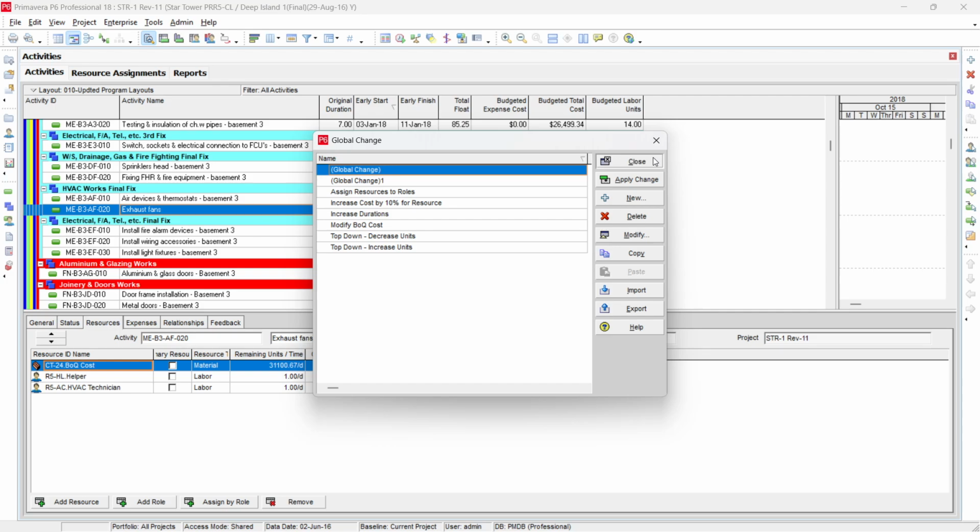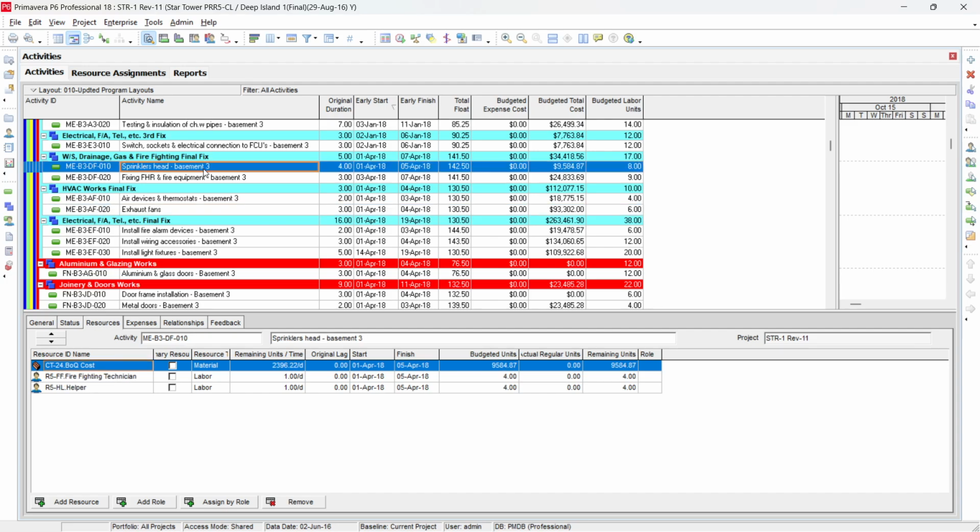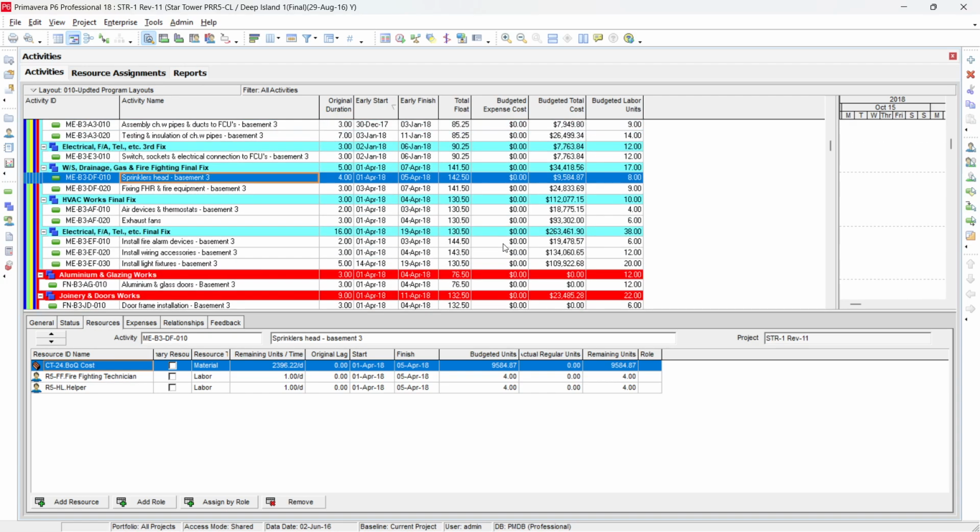My program's budgeted units and budgeted cost should become equal. Otherwise, my budgeted cost is coming very high, because the budgeted units per time are not properly taken by Primavera. So you have to investigate this, because once you check in Power BI or a pivot table, you find that your budgeted cost is not matching with your project BOQ cost.